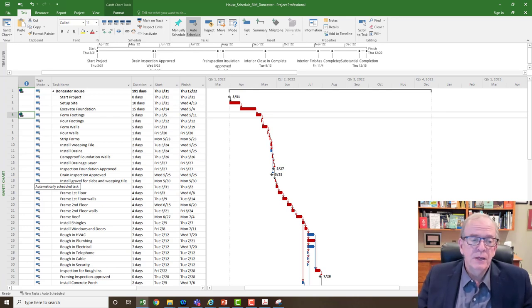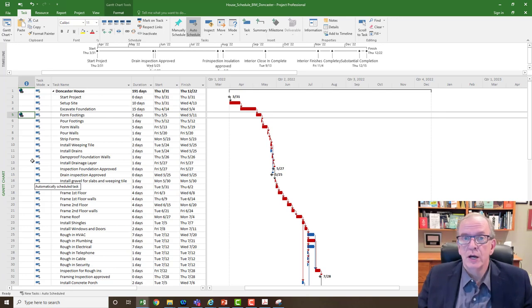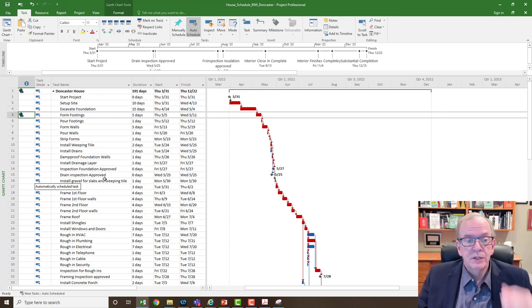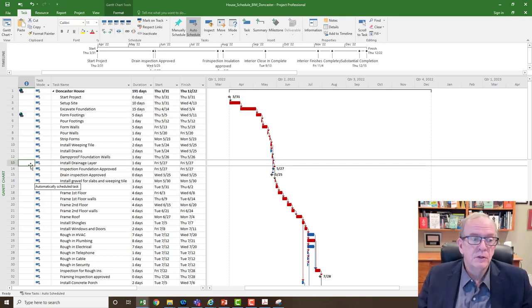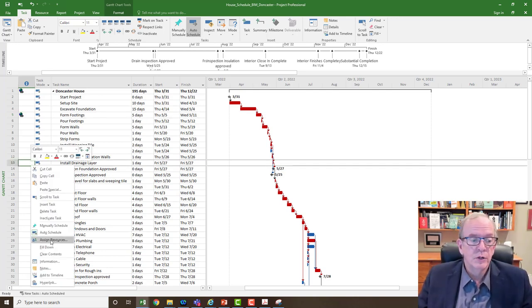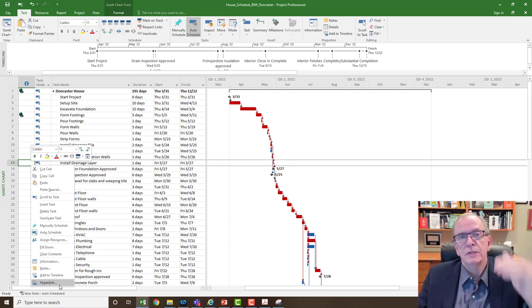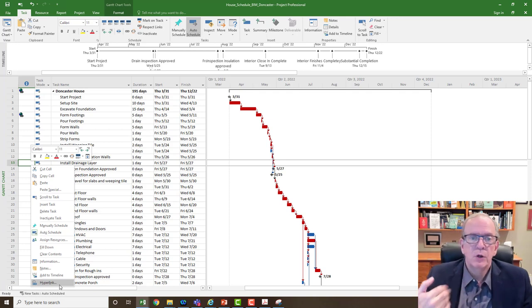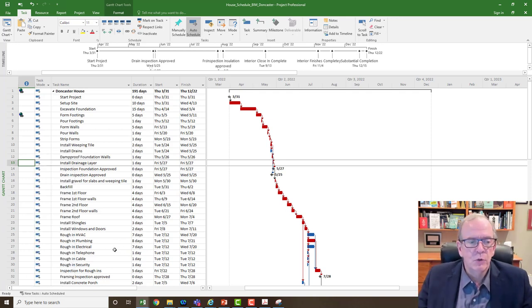The same thing would be if I had a change order in this document, I could put a hyperlink to the change order document. So I've got the change order that I've got listed with the activities and durations, and then I could put a hyperlink to the change order and that would explain all of the costing and the listing out of all the details of that particular change order.